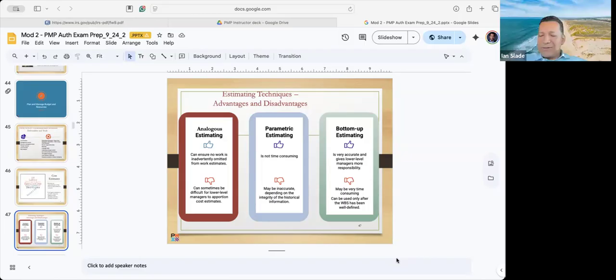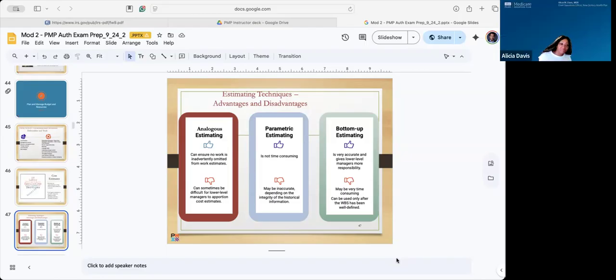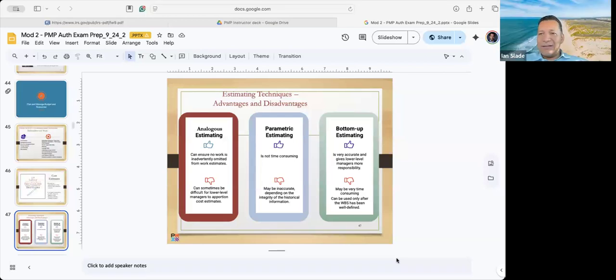So what you did there is you just looked at your existing number, and since I doubled my square footage, you pretty much doubled what you had for the initial. And applying that math is called parametric. So you just extrapolated from your initial information.